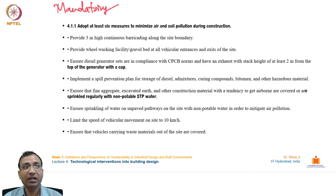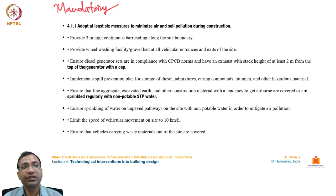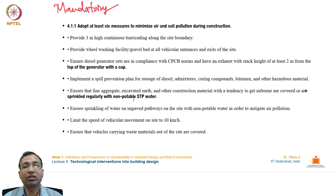Mandatory points in construction management include: adopting at least six measures to minimize air and soil pollution; providing three-meter-high continuous barricading along site boundaries; providing wheel washing and gravel bed facilities at all vehicular entrances; ensuring diesel generators comply with CPCB norms with exhaust stack height of at least two meters; implementing a spill prevention plan for diesel, admixtures, bitumen, and hazardous materials; and covering or regularly sprinkling non-potable STP water on fine aggregates and excavated earth.